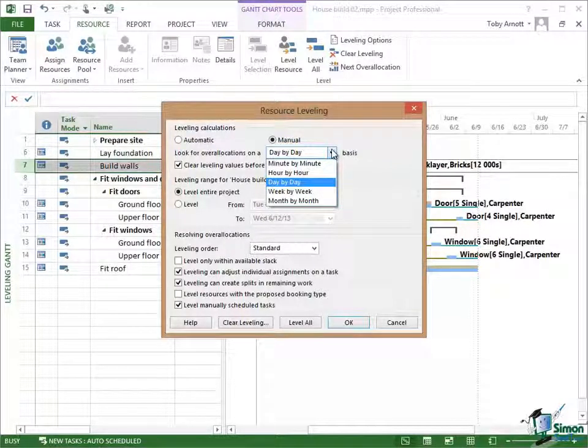So they're certainly not over allocated if they don't have any other tasks. But let's suppose that that resource has to take a day off, say to go to the doctors. So the person is working 4 days and at the doctor's on 1 day. Now during that 4 days, that person can quite easily do the 5 half days of work, the 2.5 days of work that you've got allocated.